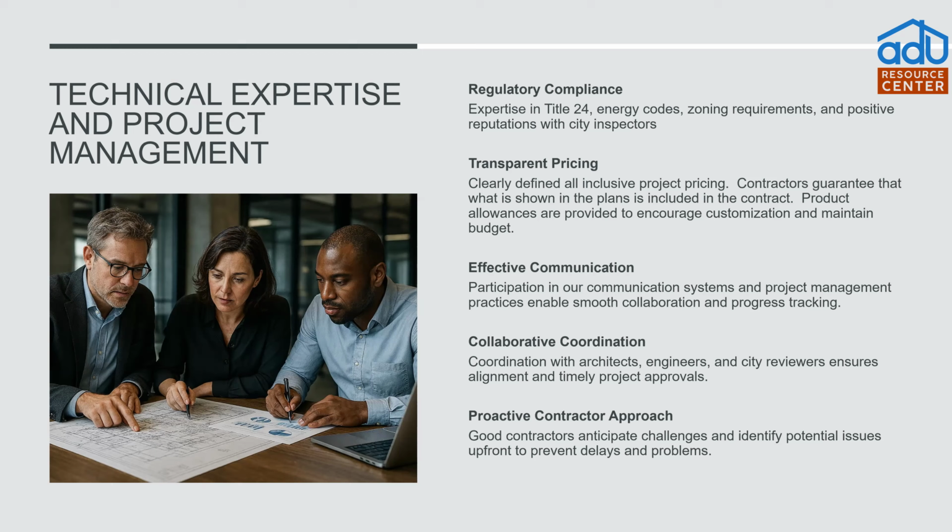That's not how projects are bid. A good contractor is going to go through all the details of the plans. They're going to go through the structural engineering. They're going to go through things like stormwater management and make sure that if they see something that is not necessarily covered in the plans, but after they've been on site and after they've had conversations with you, they will say, hey, you're probably going to want to add this, and have that discussion in the beginning of the project.